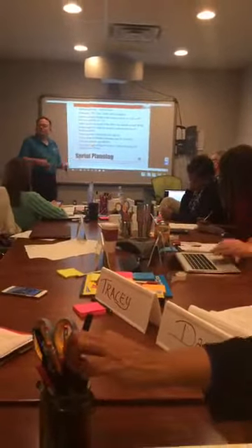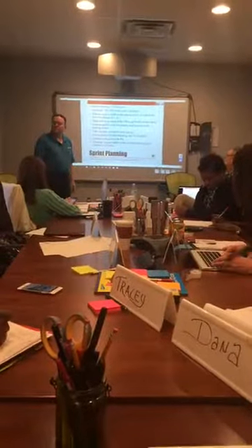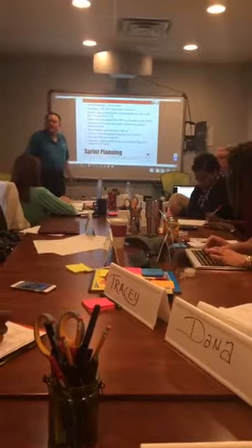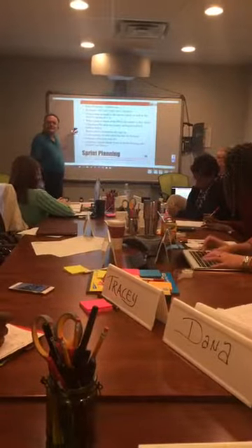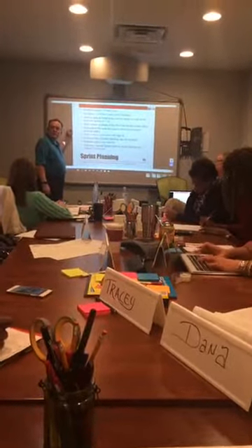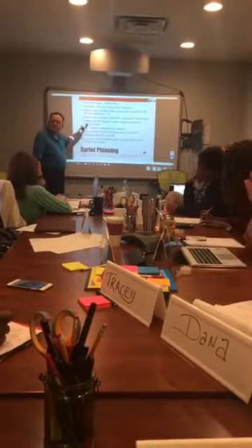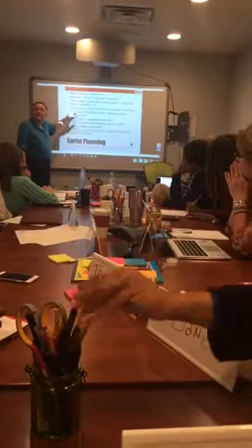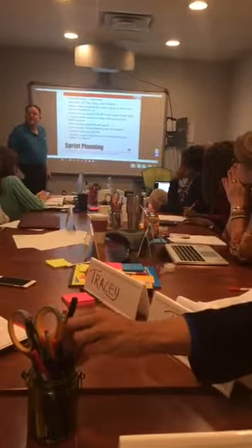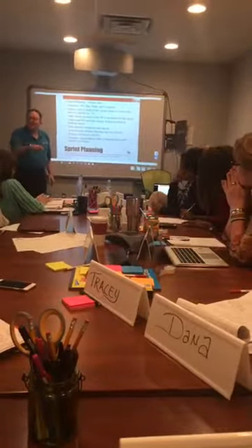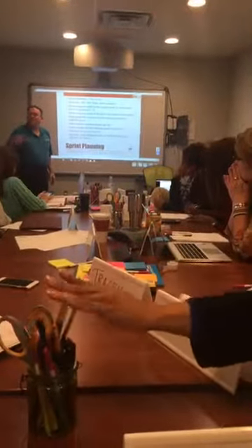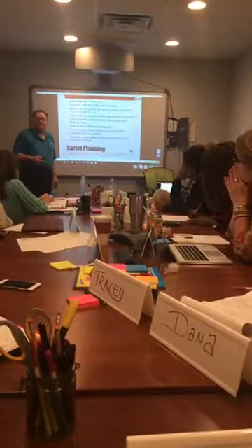Now, what happens if your user story is too large? It rolls over to another sprint. Your team can't estimate it if it's too large. It has to be small enough to the point where your team can now deconstruct it into tasks. And then your team can provide estimates for each of those tasks. Now, as they're doing that, the client is there in the room with you. So now the client understands why it's going to take the amount of time that it will take.